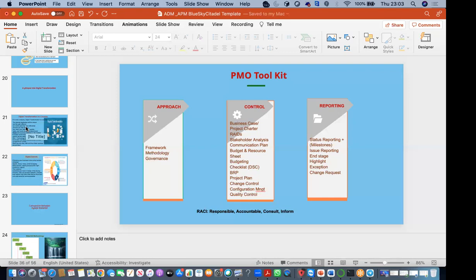Sorry, Femi, do you want to say that again, please? Okay. We use pattern. We want to see the pattern at which you have been delivering in the past sprints, let's say the last 3 sprints or the last 5 sprints. That's why we will calculate the story points that you have delivered 3 sprints ago, 2 sprints ago, and this sprint that makes the 3rd sprint that has finished. We will count those story points that your team has delivered, and we will divide it by 3. If you are looking at 5 sprints before, then you count those story points together and divide by 5. Does that make sense, guys? Yes, please. Thank you. You're welcome. I hope that's clear now.